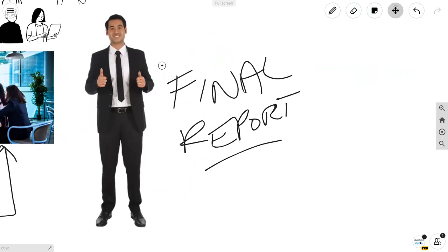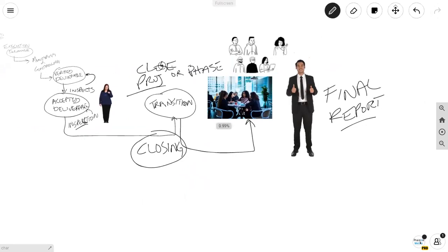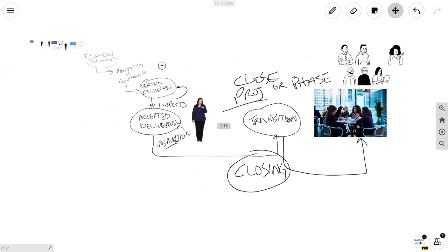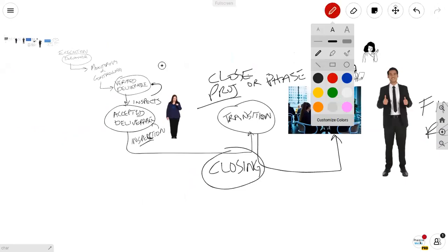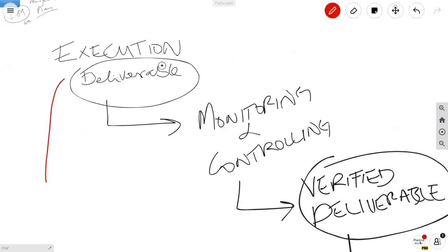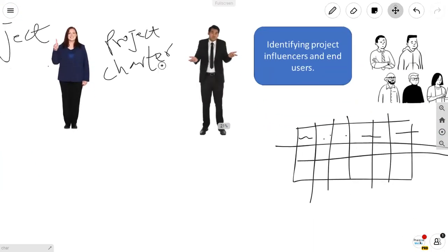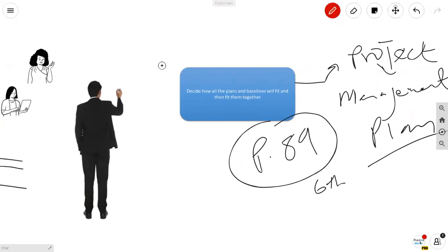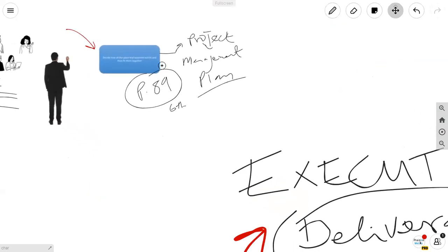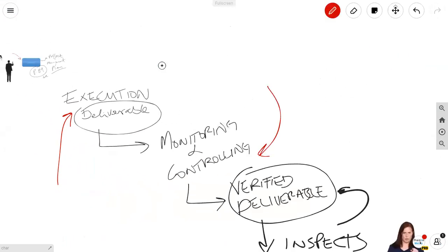This is a summary of all 49 processes. Everything else that happens in project management will plug into one of these stages. Many tools and techniques plug into execution or monitoring and controlling; quite a lot are used in planning. For example, earned value management is used here — a 0.6 SPI means you are behind schedule, and a CPI of 1.2 means you spent a dollar and got $1.20 out. Know where your tools plug in and it makes things so much easier.